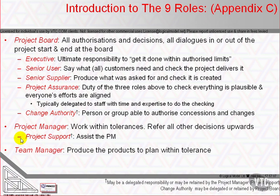The team manager's responsibility is to ensure production of products allocated to them by the project manager to an appropriate quality, in an agreed timescale, and at a cost acceptable to the project board. The team manager role reports to and takes direction from the project manager. The PRINCE2 project's heartbeat runs according to the pattern of activities described in the seven processes, which are designed to ensure that the project maintains a focus on the seven themes that healthy projects perform well — described in our next two videos.